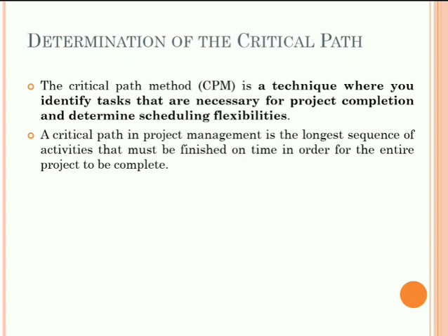The next step we can consider is estimating the task duration. To calculate the critical path, the longest sequence of critical tasks, you first need to estimate the duration of each and every activity. To estimate the duration, you have to make educated guesses based on experience and knowledge. You have to make estimations based on previous project data. You also have to make estimates based on industry standards. This is how you can estimate the duration of that particular project.